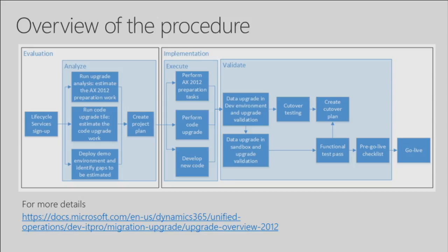Then you deploy a demo or sandbox environment of AX7 or of finance and operations. This is where you do your fit gap analysis. And at the end, you create a project plan. That's the end of your evaluate phase.